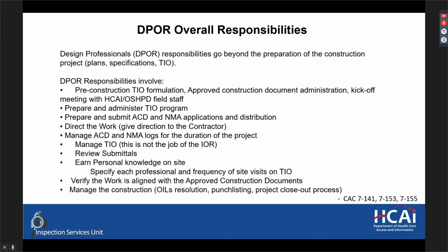The main responsibility for the DPOR is preparing and administering the TIO program, preparing and submitting ACD and NMA applications and distributing those to the project team once approved, directing the work, or primarily giving direction to the contractor, interpreting the drawings for the IOR, and clarifying any questions tied to the design documents for the contractor, managing the ACD and NMA logs for the duration of the project.